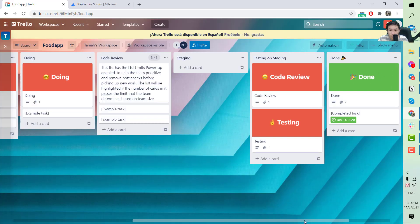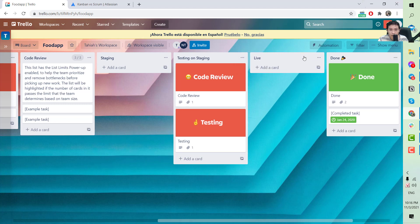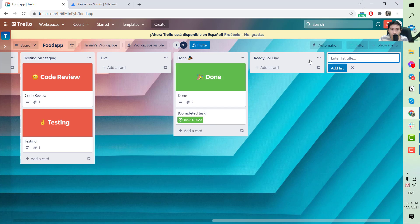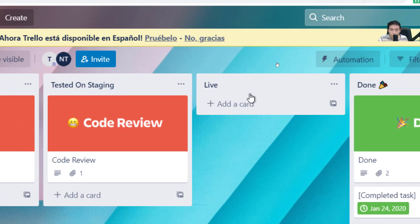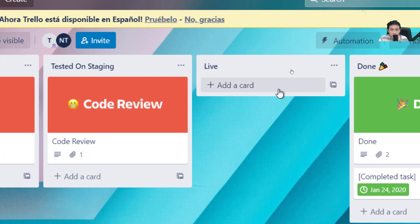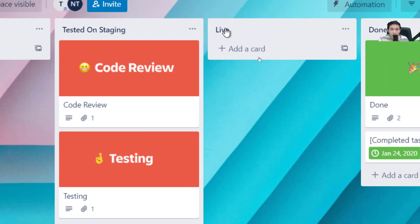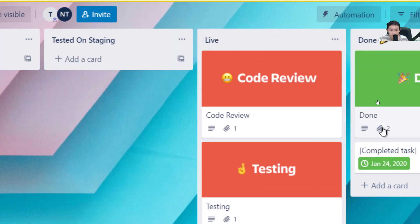After testing on staging, developers need to deploy the ticket to the live environment — where actual end users use the features that have been tested. Two additional columns are needed: 'Ready for Live' — where tested tickets are collected — and 'Live', where cards are placed after the developer deploys them, for example batching multiple tickets once a week to the live site.